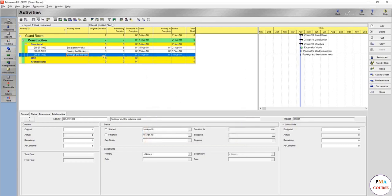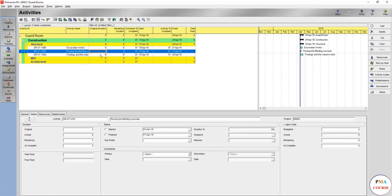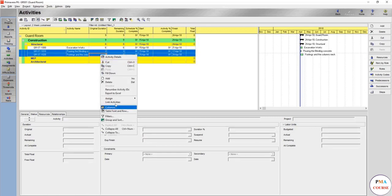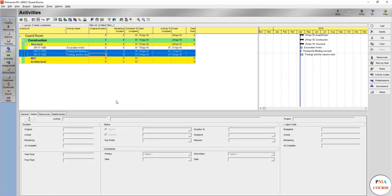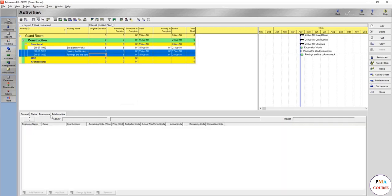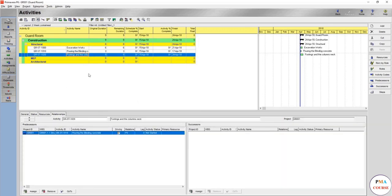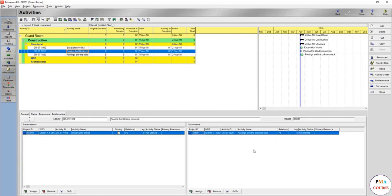We will give this for example eight days. And as well we are going to link this, finish to start, link activities. So now you are going to see this one here as a predecessor and this one here comes as the successor.